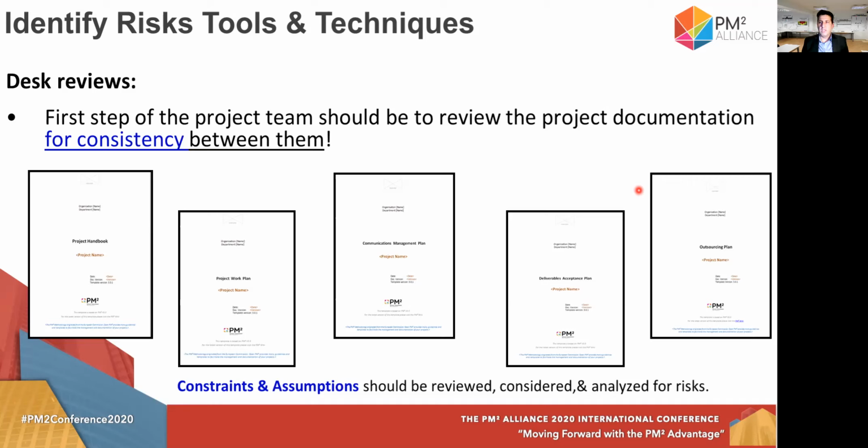Try to find out if a team didn't work with integration, but worked in a silo. Try to find out that the project handbook and the project work plan are combined together, are integrated. Of course, do not forget to check and analyze the constraints and the assumptions of your project. You have to review everything. You have to analyze it, because constraints and assumptions are the main causes of risks.